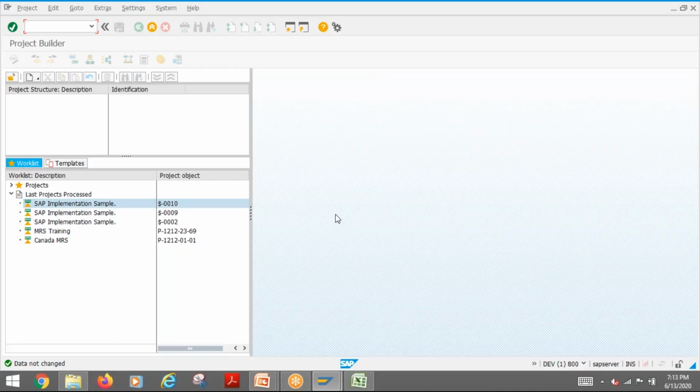Okay. So I don't need to do any activities. Based on that, it will automatically take today scheduling. Yes, it will take it automatically. Only thing is, in the configuration you should mention that the number of days allowed in the past is 0. That configuration is there. I will show that. I did not go through the network configuration, so I thought we'll complete this, explain the functionality, then we'll show it together.